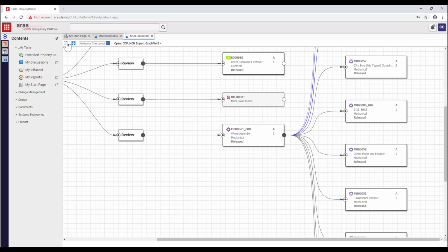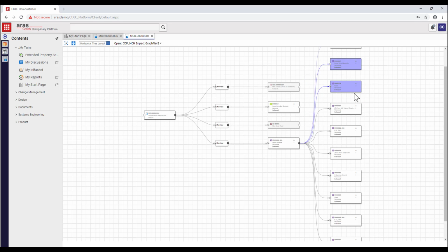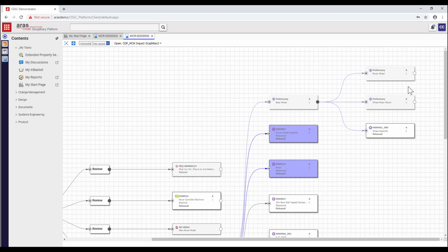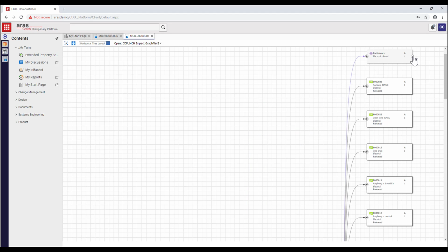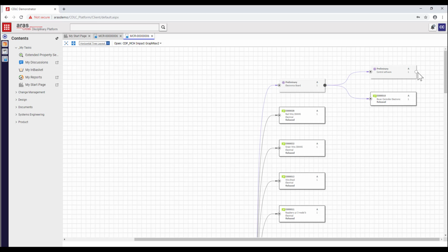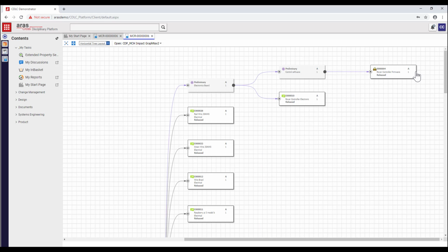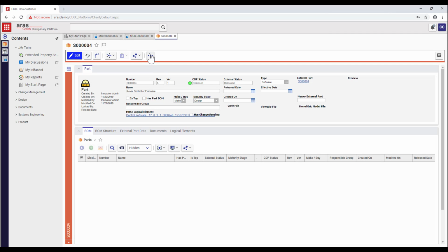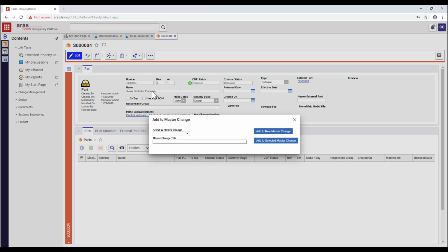As we begin to drill down throughout the system, we can see parent parts, which are blue, along with system elements, which are gray. And because elements from the systems model connect software, hardware, and electronic parts, we actually find a common parent in the system model that relates the wheel to a controller board that drives it and has a piece of firmware on board. Using this built-in impact analysis, the change coordinator determines that the controller board firmware will be affected by changing the wheel thickness, and she goes ahead and adds that firmware to the change.